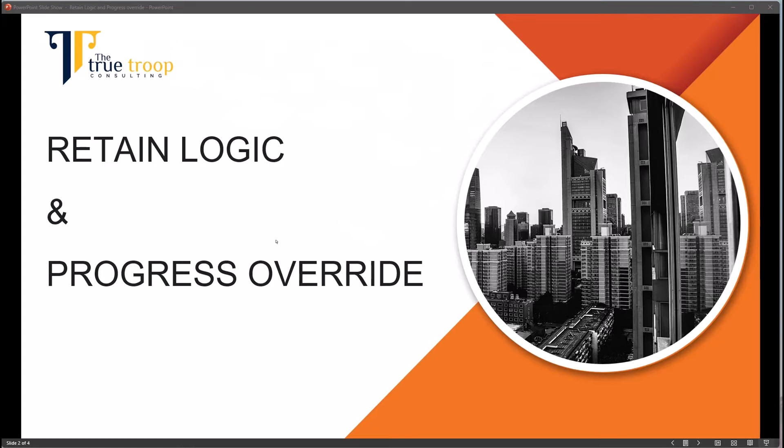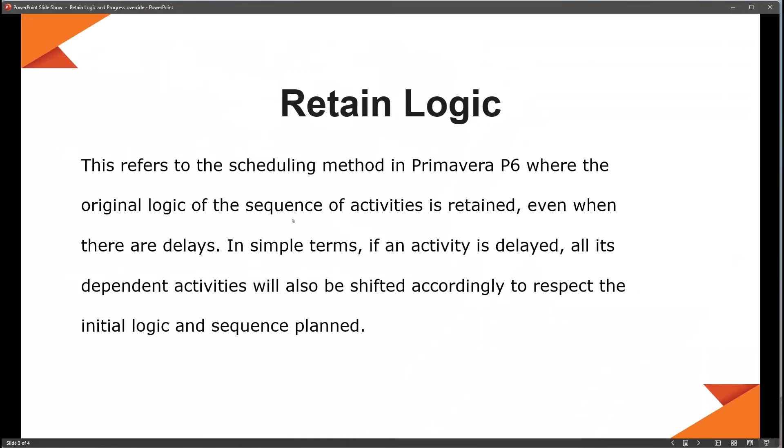Let's go into the definition. Retain logic — as the name implies, you're retaining the logic. This refers to the scheduling method in Primavera P6 where the original logic, or the sequence of activities, is retained, even when there are delays. So even if there's a delay on your project, the original logic will still be maintained.